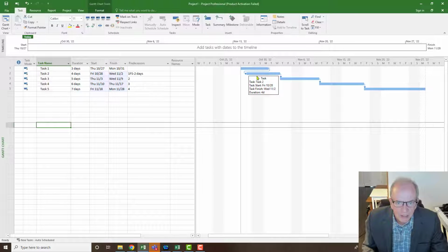So that's what we'd call a lead time. So that is pulling this activity back behind this activity. We have a finish to start relationship and it's saying minus 2 days. By the way, it's saying minus 2 working days, which is not counting Sunday and Saturday. So that's what's going on there, right?